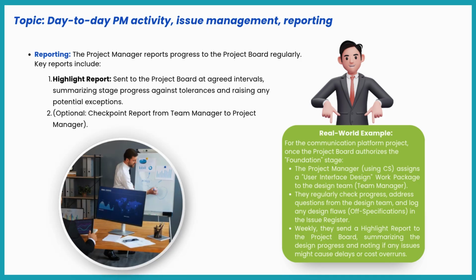Now, let's talk about reporting as part of the project manager's day-to-day activity in the Controlling a Stage CS process. The project manager regularly updates the project board on progress. The key report is the highlight report, which is sent at agreed intervals, summarizes stage progress against tolerances, and raises any exceptions or concerns. Optionally, the checkpoint report can be sent by team managers to the project manager to share detailed updates.